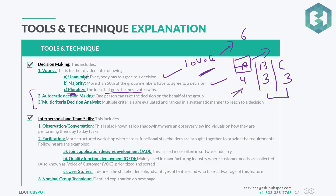Then we have autocratic decision making — one person takes the decision on behalf of the group. Sometimes when a conflict arises in my group, I guide the conversation, but if it goes out of hand I stop the comments or delete the post and use autocratic decision making. For example, if a senior VP is in the room during requirements gathering and everyone agrees with whatever the VP says, that's autocratic decision making — not necessarily right or wrong, just a type of technique.